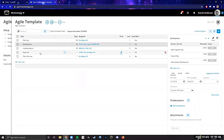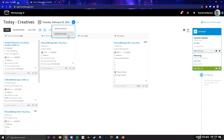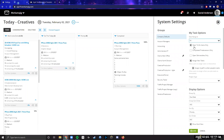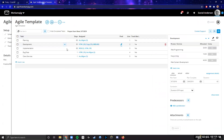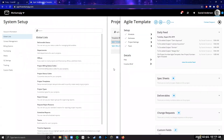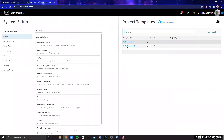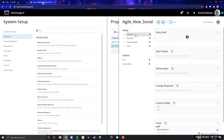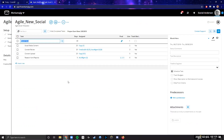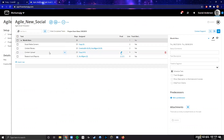One more thing I mentioned: to-dos are something that we have turned off on your projects by default. You can show them via the 'Use To-Do Items' option in project settings. One feature on the Creatives Today page is that you can have task cards hide unless they have open to-dos — so for something like bug fixes, a task only appears when there's an active to-do on it. I won't have time for a full training on to-dos today, but just as a preview: if the to-do option is turned on, within any task you have the option to create a to-do list.